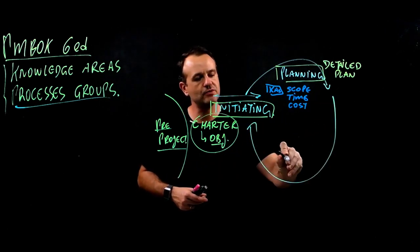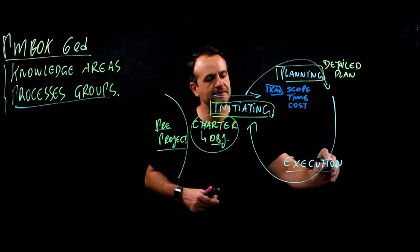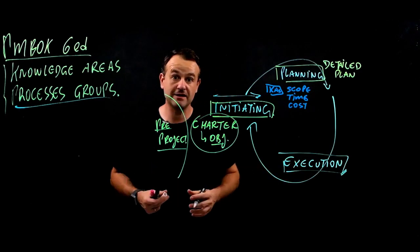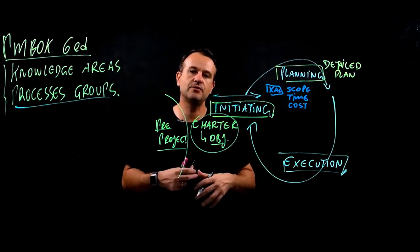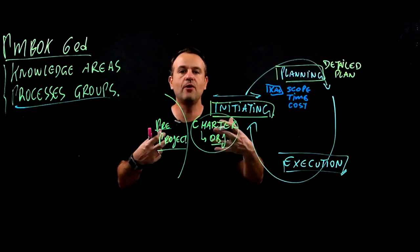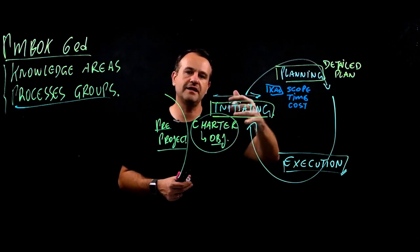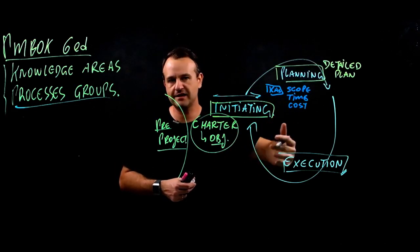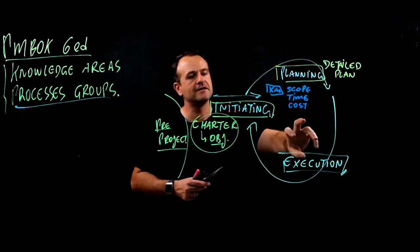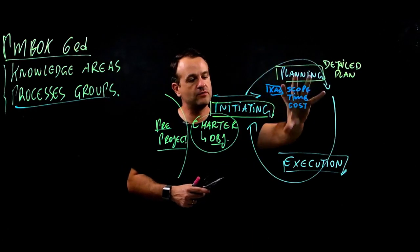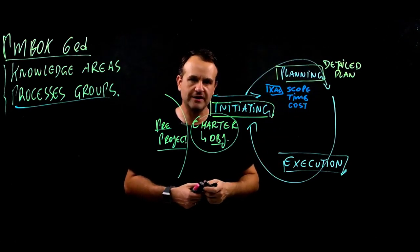As we are doing the planning, then we can go to the execution. Sometimes we do all the planning front-end loading, and then after the plan is complete we go to execution. Usually what happens is that we are building the plan in what we call rolling wave planning — we plan and then we execute, we plan the next phase, we plan the next steps and we execute the next steps. This is an iterative process where we plan, execute, plan the next stage, execute, and also get feedback from the execution.